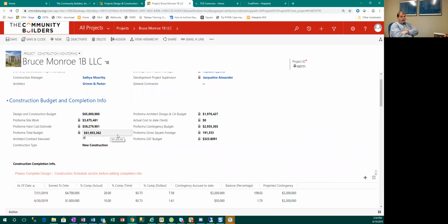We don't want to track it that way. We want to track against what we started with and see how we perform. So when you look at the project logs down there, here's what we've approved as far as change orders, and here's what we're projecting. Ideally, the sum of those two numbers should never exceed 2.935. Actually, ideally, the sum of those two numbers will be 80% of 2.935. That's our goal: to finish projects with less than 80% of the contingency spent.